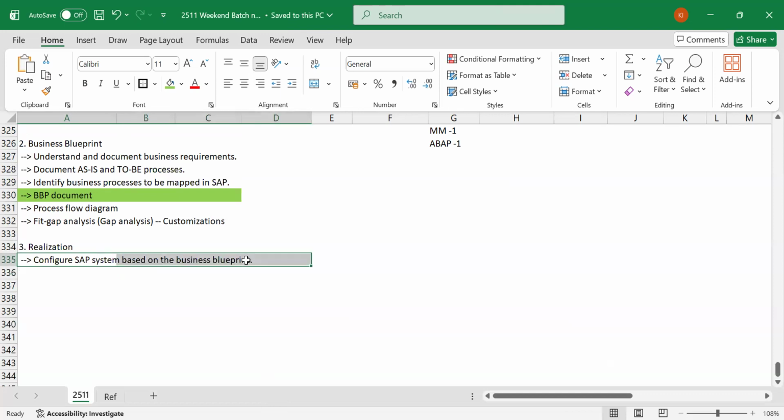Whether it is easy or not easy doesn't matter. There might be something which you feel is easy and also helpful to the business. Let me implement it? Nothing doing. You cannot do that without prior approval. Anything that you want to implement or configure that is new, you need to get business approval. Only when they say, yes, please go ahead, then you can do it.